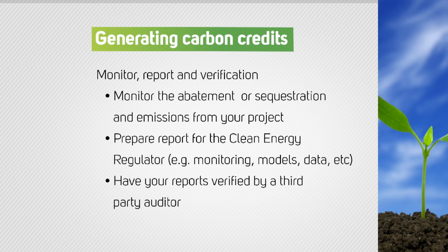Monitor and report on your project. This is when you're actually implementing the project. When you're actually undertaking the activity, you need to monitor it. All right, for example, under the permanent environmental planting, you have to record how much fuel you've used, the type of fuel you've used, and what the greenhouse gas emissions are associated with that fuel use for managing the project.